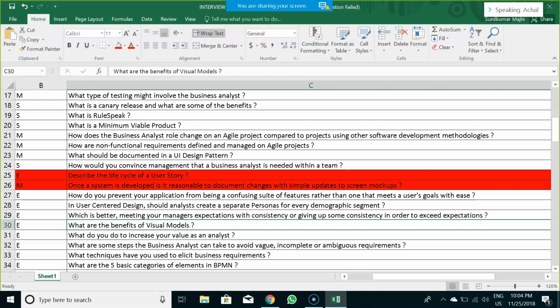Once the first iteration is ready to kick off, the conversations begin for each user story between members of the team. The user stories get updated with details on the conversation captured in the form of acceptance criteria that we write for each user story. User stories can be updated at any point according to the needs, and if there are ambiguous details about user stories, we can update them and make them clear for the development team. If a user story remains incomplete during the iteration, we put it back into the product backlog or shift it to the next cycle.